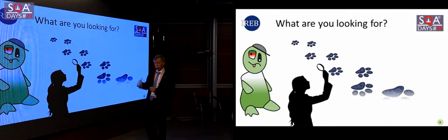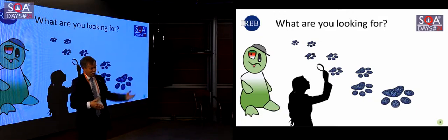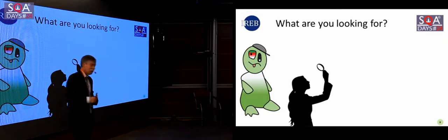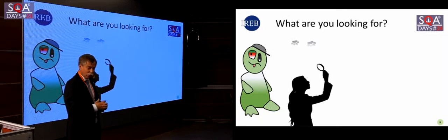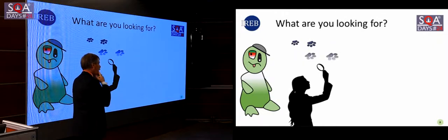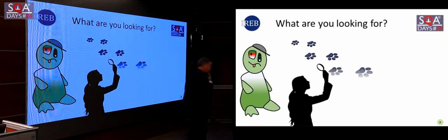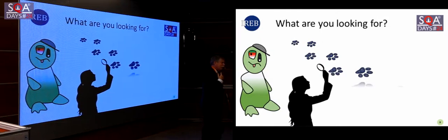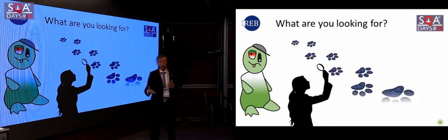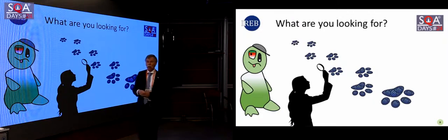So we went with the system to the audit department, and said this is a new system, we've tested it, it works fine, and here are the proofs that we pay the right bills, etc. And they said, oh yeah, looks good. You could go into production. Yes, looks really good. But by the way, how can we check the audit trail? What do you say, audit trail? What do you mean by audit trail? Well, we have to know exactly who entered this data and when it was passed, and was it changed, and oops.